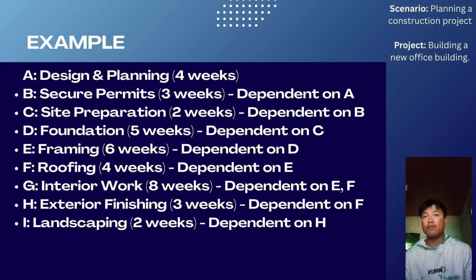B, secure permits for 3 weeks, dependent on A. C, site preparation, 2 weeks, dependent on B. D, foundation, 5 weeks, dependent on C. E, framing, 6 weeks, dependent on D. And F, roofing, 4 weeks, dependent on E.